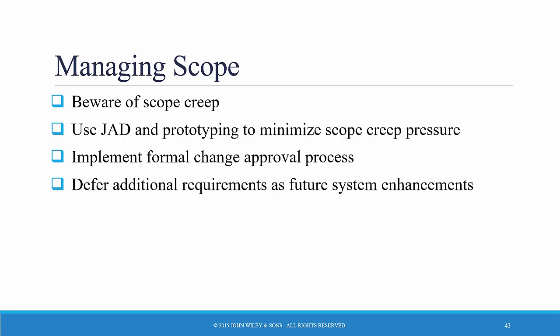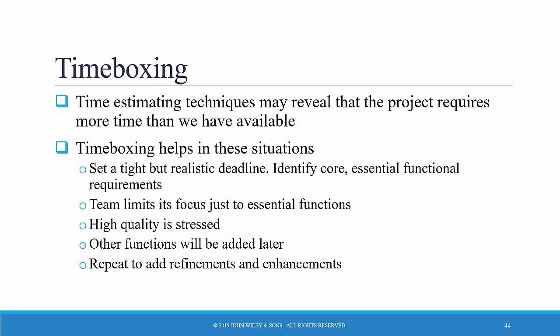There are various ways you can manage scope, but formal change orders are a good approach. The best way is to try to get all requirements in front, and regardless of whether you do or not, have an agreement with the client that if more come up, you need more time. To combat time overruns, time boxing is used. Time boxing says we have, say, nine months to develop this, and we're going to do it in nine months. If three months in we realize we're not going to make it, we start leaving things out so we can still hit the nine-month goal.